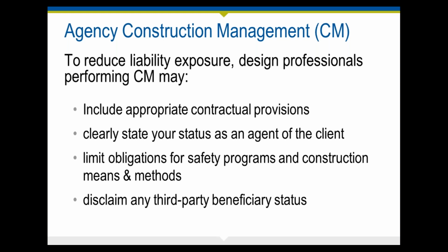Most PL insurance policies, including ours, will provide coverage for claims that arise out of the agency construction management services that you provide. It does not provide coverage for claims arising out of non-professional advice or services, including the actual performance of construction work by you or others directly retained by you. So just be aware that if you are going beyond providing agency CM services and assuming responsibility for construction, that is indeed a business risk that is not covered by insurance.